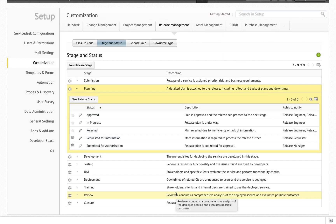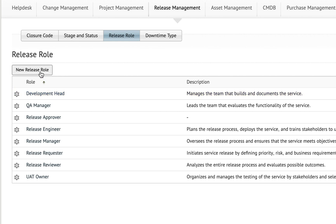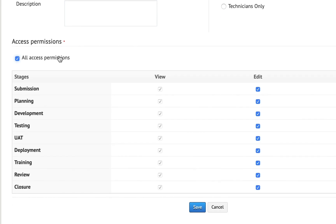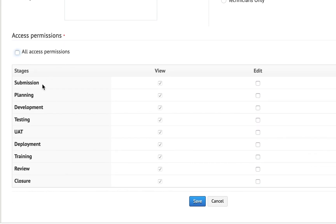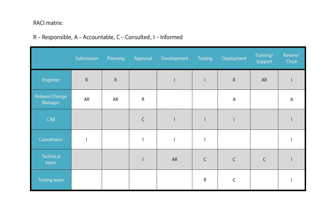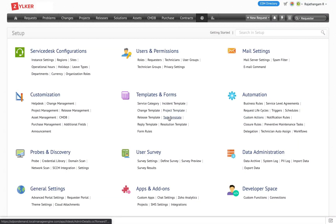Release roles are created either for all users or only for technicians. You can allow access for all stages and actions, or pick and choose what action should be available for each stage. This role can be compared to a RACI matrix — you can determine who needs to be part of a specific operation by choosing responsible, accountable, consulted, or informed operations. These release roles are used in stage and status, which are used in the workflow, and the workflow is mapped to a release template.